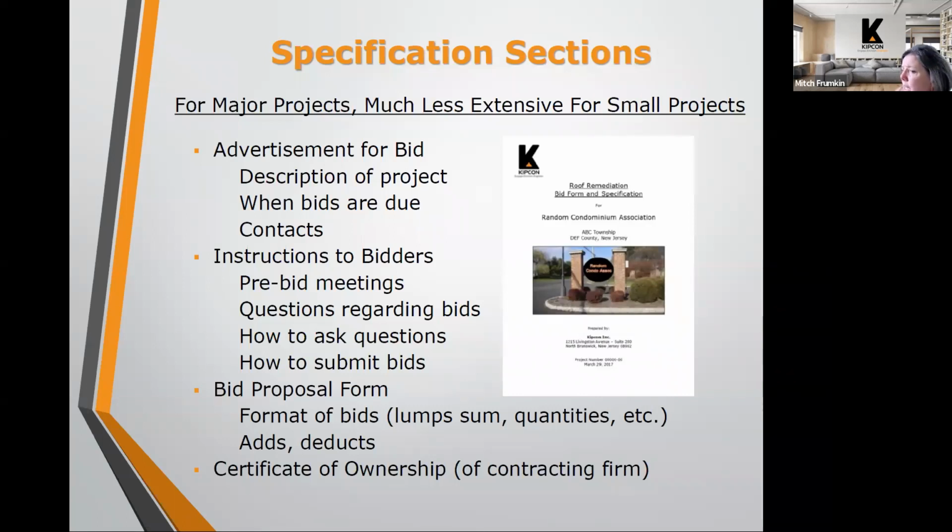In some cases, there is a pre-bid meeting. If it's a project where there's going to be a walkthrough of contractors before they provide bids, it may be done as a group, where there's a specific day arranged for all the contractors to meet on site and walk through with either the design engineer or the owner's representative to discuss what work is going to be done, and to take any questions that the contractors may have regarding those bids.